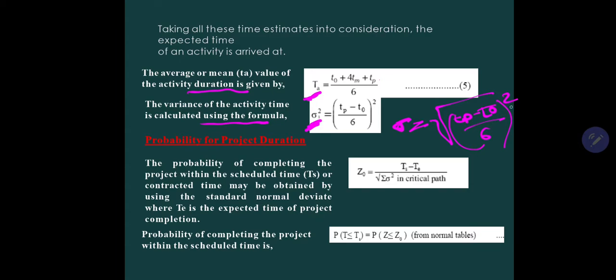The probability of the project duration is called Z. Formula is given as: the estimated time divided by under root of sigma square, summation of sigma square in critical path. What you have to do is only calculate summation of sigma square, the variance, only of those activities which are coming under the critical path. The probability of completing the project within the scheduled time or contracted time may be obtained by using the standard normal deviate where T is the expected time of project completion. The probability can be calculated from this formula and the values are obtained from normal tables.